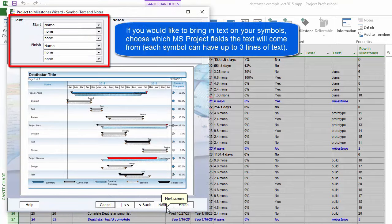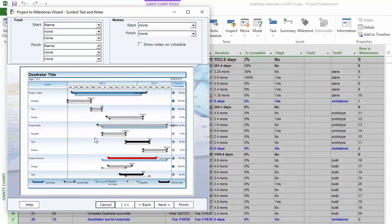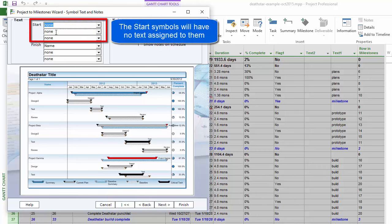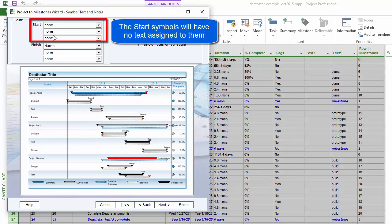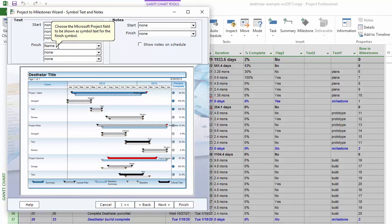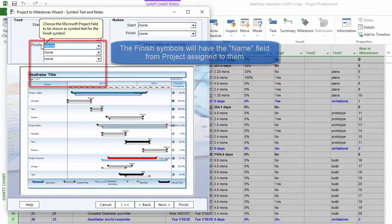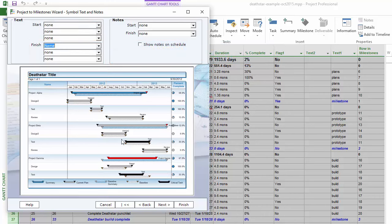Now this is where we can set our symbol text. For this import option we're bringing in Gantt bars, and each Gantt bar has a start symbol and a finish symbol, each of which can have symbol text. I'll set the start symbol text to none. The first line of symbol text on the finish symbol is going to be the name field from Project. If you had any other fields you wanted to use, like a text field or number field, you could set that there.